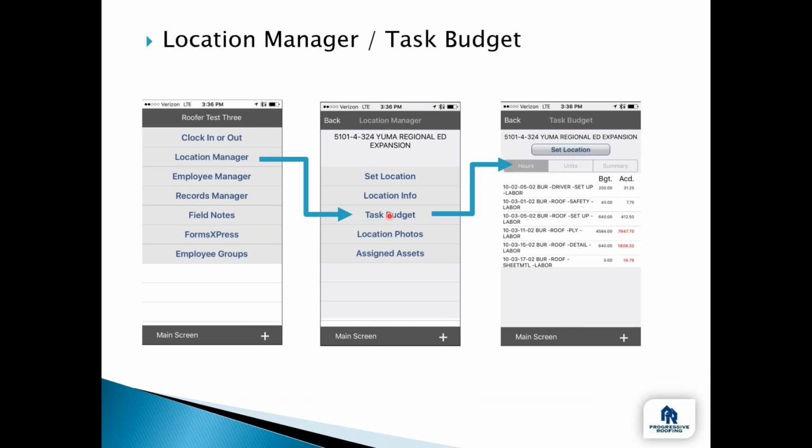Next, the third item in your submenu is Task Manager. This is where you will see all the budgeted hours that have been estimated for the job, including, which is this line here, the accumulated hours worked on the job so far. And we'll practice that in a minute. There's a couple more columns you can't see over here, but it's very rich with information.